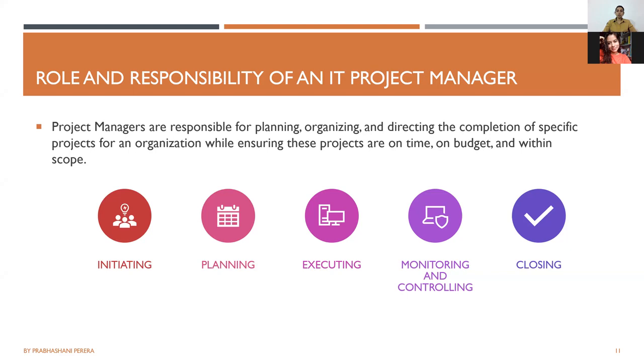And the final part is closing. When you think about closing, it feels like, oh, this is easy. You just complete all the tasks in your project plan and then we are done. But this is a very key stage, because this is where you talk about your lessons learned. If there are things that you learn from your project, you do a retrospective and document those, because going forward, if there's a similar project, this is your go-to point of what went right, what went wrong, and how we can improve, right?